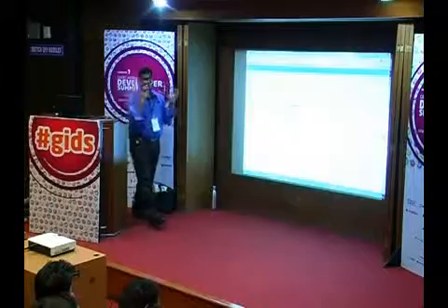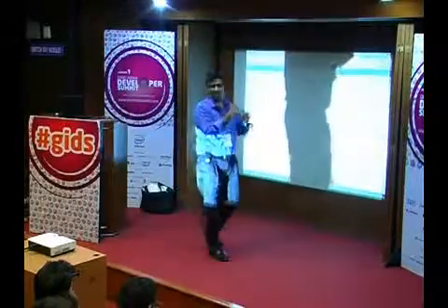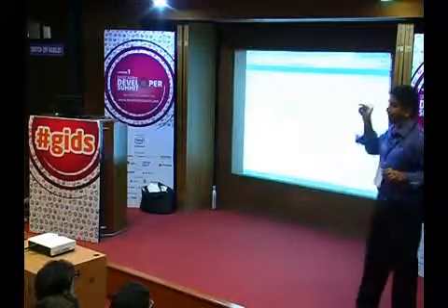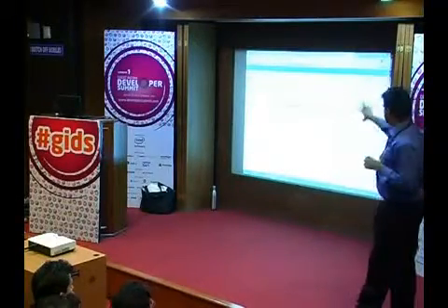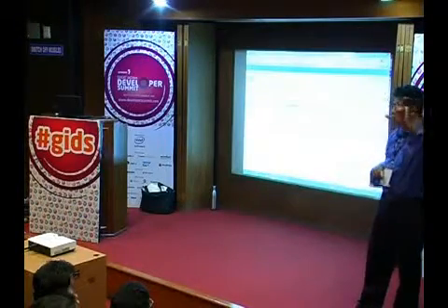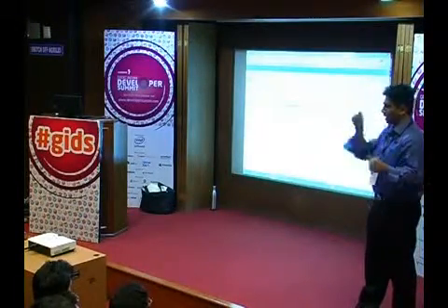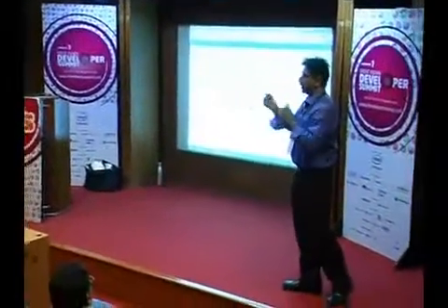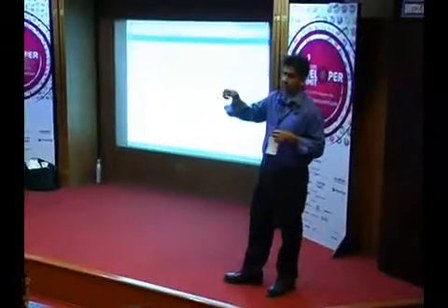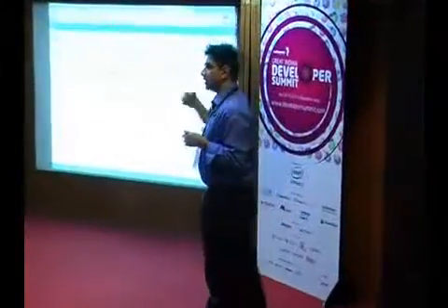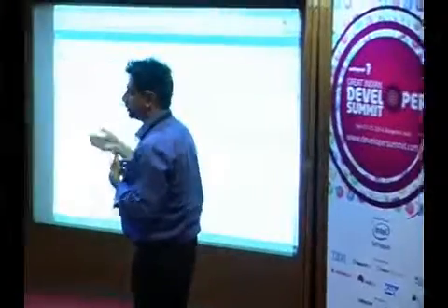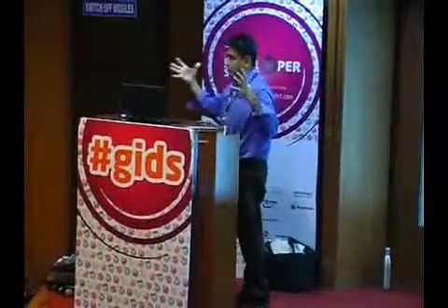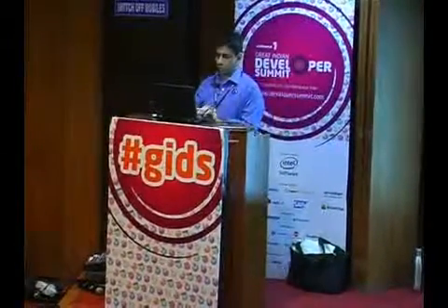So all your requirements management, the equivalent of Jira, and all your task management is something that you can define. Because we chose the agile process template, it gives us a template where I can put everything into a backlog, and it gives me a burn down board. So I can drag and drop and assign items to users. I can drag and drop tasks to the current sprint and say, in this sprint pick up all of these items. It will measure a sprint burn down. It will tell me the speed at which I am going, and whether I will actually finish or not. It tracks things, so it gives me a complete project management dashboard. Okay?